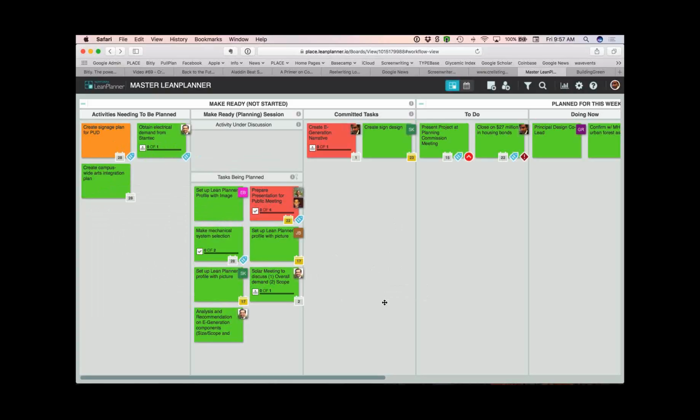Yeah, that makes sense, Alex. Thanks. I'd like to add a couple of things. The place where this adds value is that once you create physical cards, there's no way to get visibility to everyone on the team. Chris, you mentioned that. And the key thing is, if you don't track and update, and the dates fall behind, then the accuracy of all the information on the cards goes away.